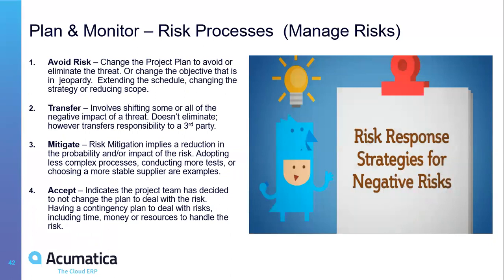Or you transfer the risk, which means you give the responsibility to a third party. For example, tell the customer to make sure that the room is available in the project. Now I'm taking very simple examples to make it easier to understand. Tell the customer, these are the dates. Here you have the overall project schedule. This part of the schedule is where we need a room. Please help us to have the room, to have a projector, to have an internet connection, and push it out. This is one other option that you have there.